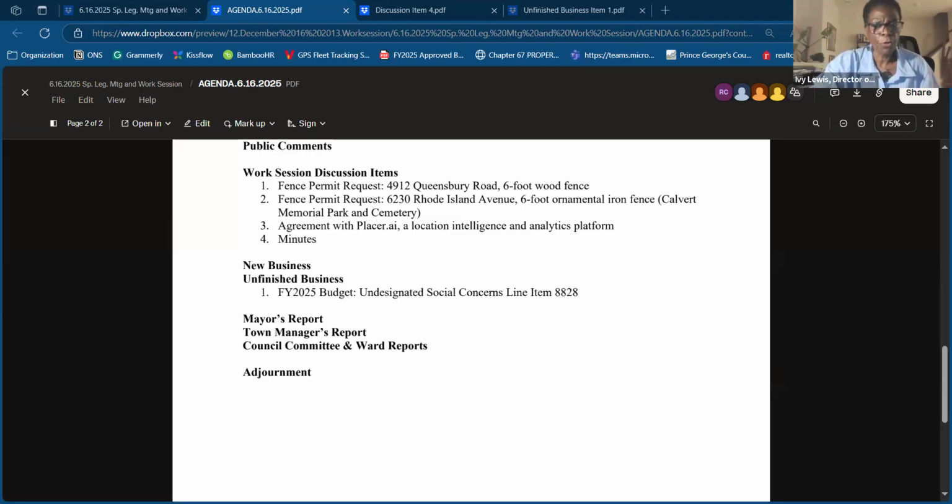The AV contractor thought their work could be completed in 30 days, and I think they're in sort of week 2. And I would expect the fire alarm upgrades to be completed in a month as well, or at least by the end of July. I would hope the county can conduct the final inspection within 30 days or 24. Okay, so we should have the building ready by the August 25th meeting, so that we would be having a work session in those chambers. Yes, it should be possible. We'll keep you posted along the way, but it should be possible.